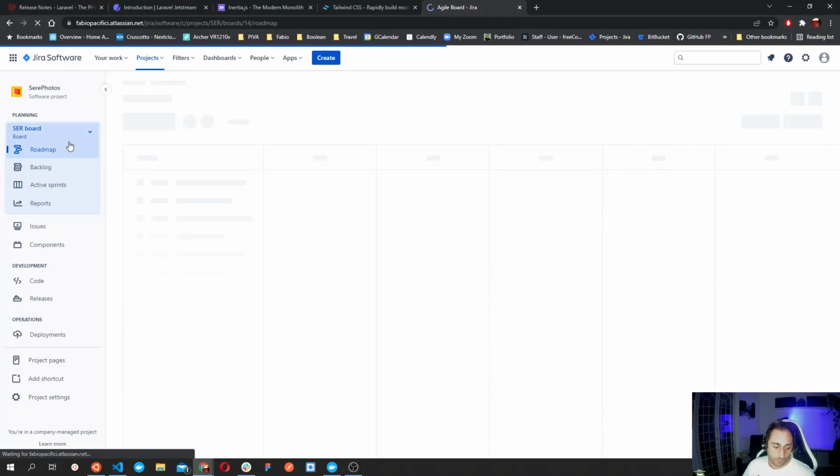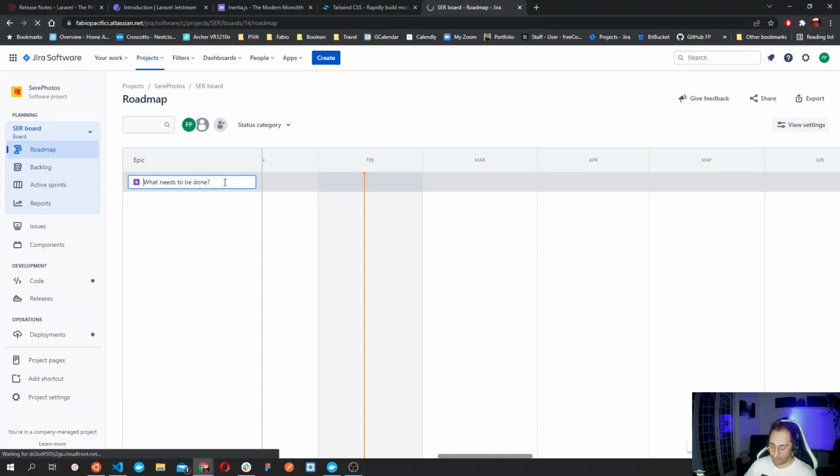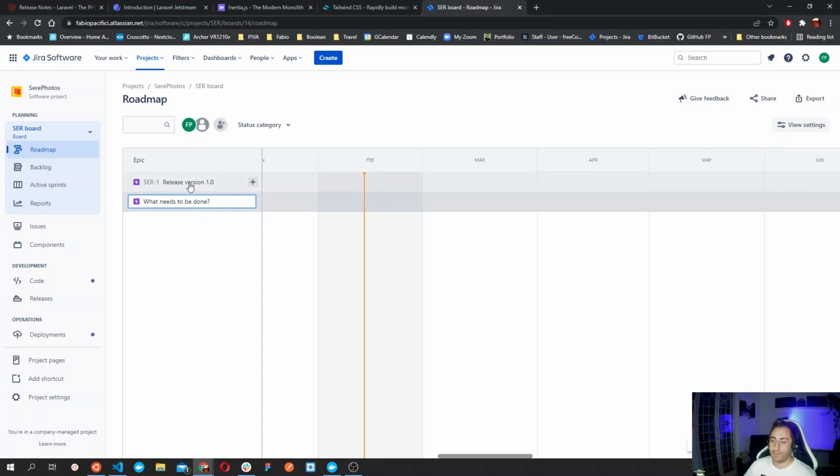Now that the project is inside Jira, we can define the roadmap. Let's say release version 1.0. That's going to be the first epic that I want to create, and then inside this epic, let's write a couple of user stories based on what Serena told me.